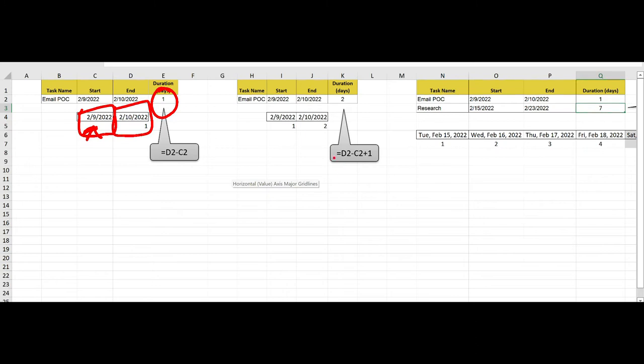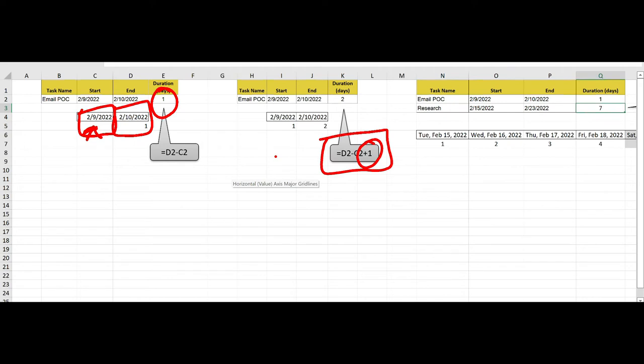So if you need to actually see this as two days, then we need to come over here and use this formula. So it's still a simple formula, and I'm still taking the end date minus the start date, but I'm adding one back to it. So it's calculating my start date and this second date. So it's returning two. So again, it kind of depends on how you need your scheduling to work.